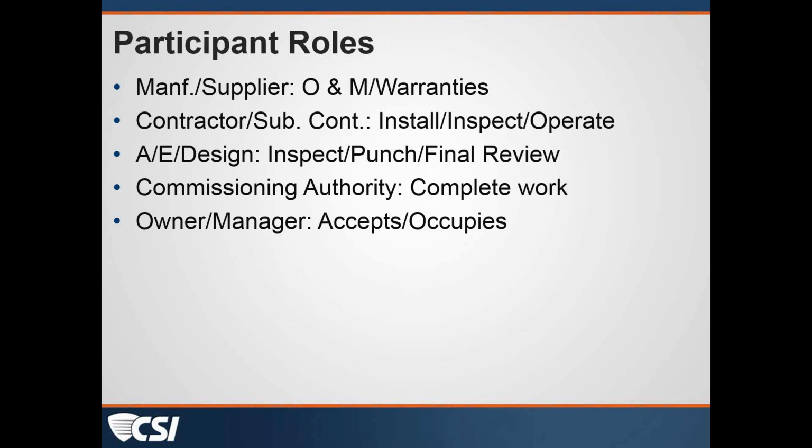I know one thing with warranties I always do is require them to submit warranties with the submittal process. And I check the warranties to make sure that if I say I want a manufacturer's 5-year warranty on something instead of the standard 1-year warranty that you typically get, the warranty indicates that.